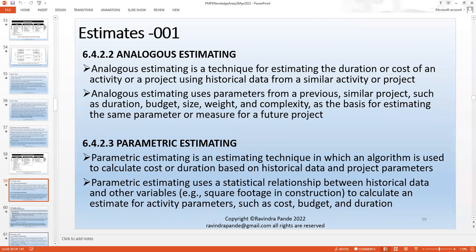No. Okay. Other than these, in today's world, we normally use lines of code or kilo lines of code in software, or function point estimation whenever we do manufacturing or software industry. The line of code basically pertains to how many lines of code this functionality, this module needs. So if you are looking at say around 2000 lines of code, then there are baselines given at industry level. For core Java, we normally take 180 lines of code per day of productivity. For .NET, we might take 210 lines of code per day per resource with more than 3 years of experience, and so on and so forth.